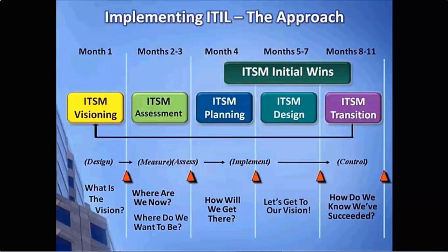In this step, we'll be looking at why we're doing the ITIL implementation, what are the key business objectives, goals, and strategies for moving forward. Then we will move to the IT Service Management Assessment step. In the assessment step, we will assess our current state processes, technologies, organization, governance and reporting practices, and we will look to see what gaps exist between those elements and the vision that we set in the first step.